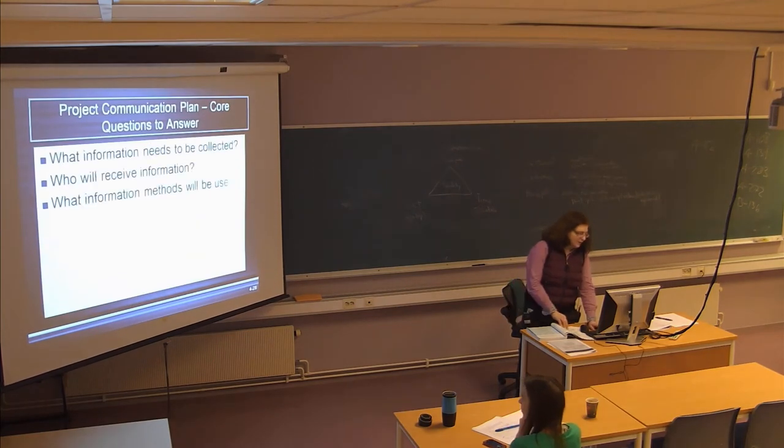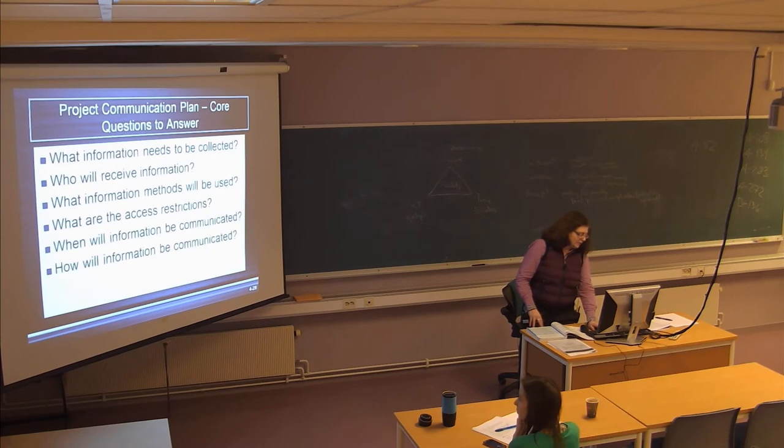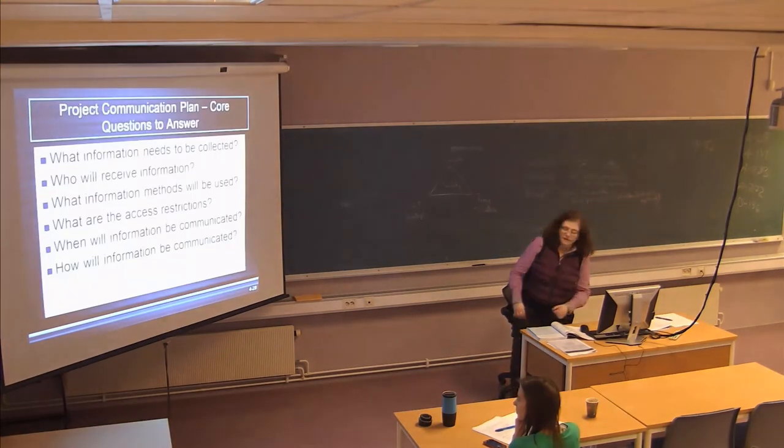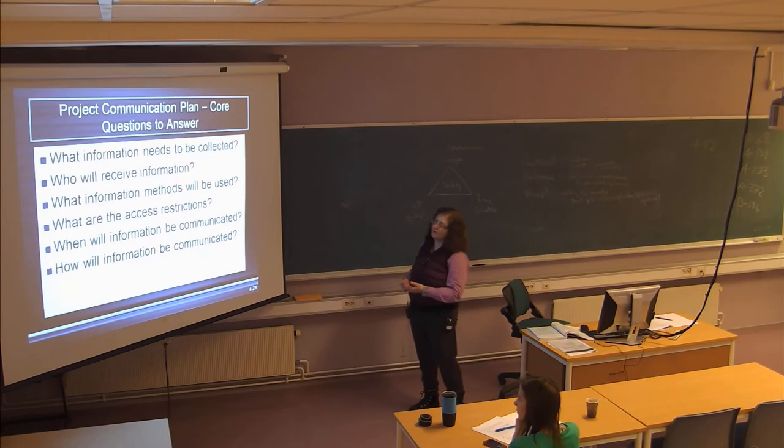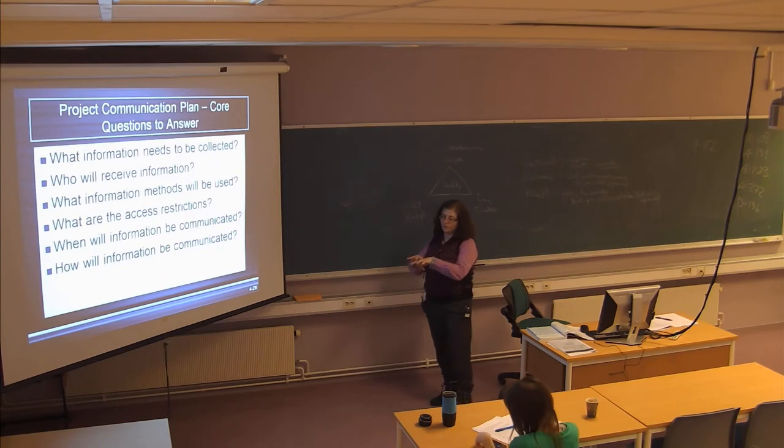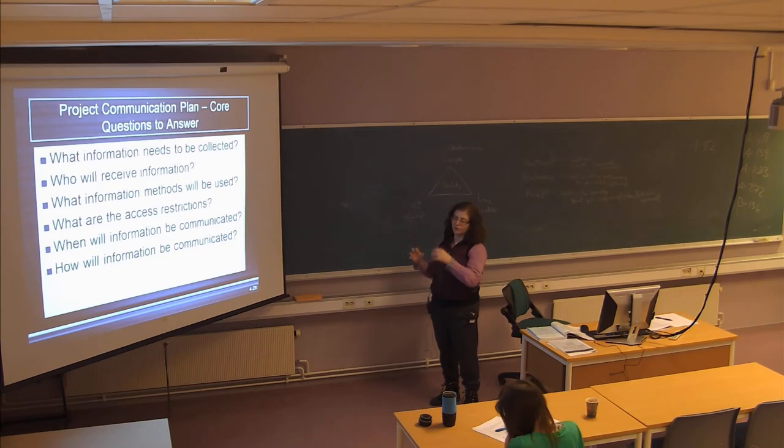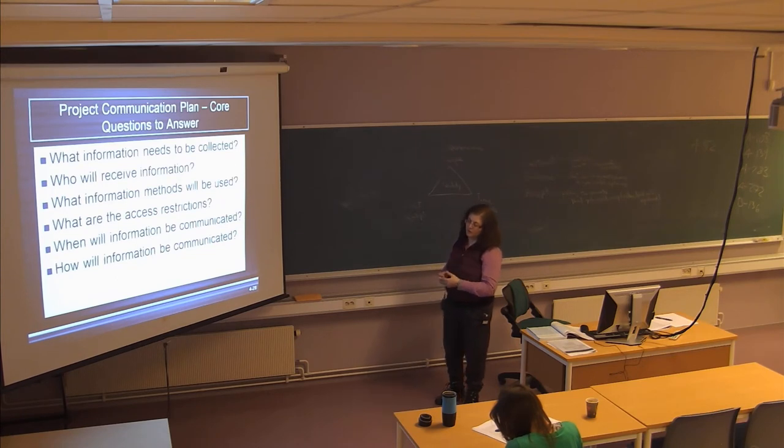So the communication plan has to answer these questions. What is the information needs? Who's going to receive it? What method is going to be used to share it? What are the access restrictions? That means what parts of the information are closed to the group, or what parts are open to others, because there's different stakeholders with different types of access rights. And when is it going to be communicated, and how will it be communicated?